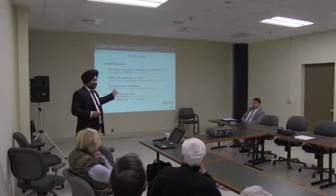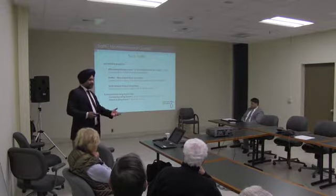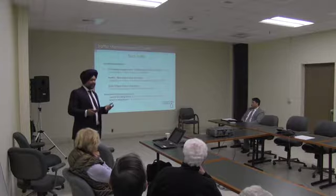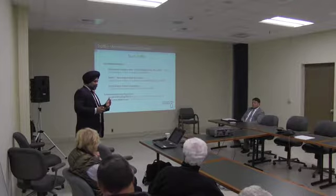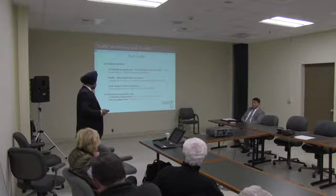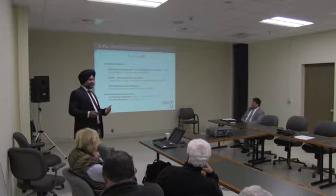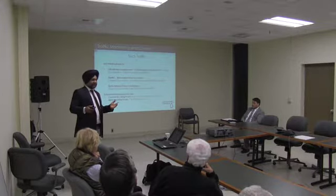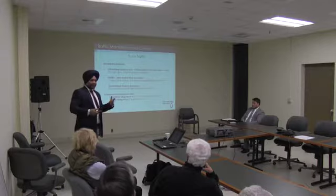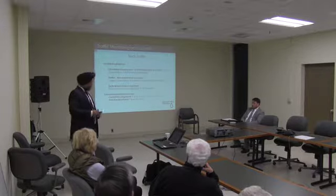Thank you. Yes. So these are the trucking hours we had, and we went through an extensive study on the traffic. We hired a traffic consultant to do the traffic analysis. Our environmental planner did all the calculations, and then we were able to get the approval for increasing the truck hours from 7 a.m. to 6 p.m. We will be implementing that on a trial basis and see how it goes. It's not a permanent change at this point. We're going to go in a trial mode. If everything works out, it may extend throughout the project.